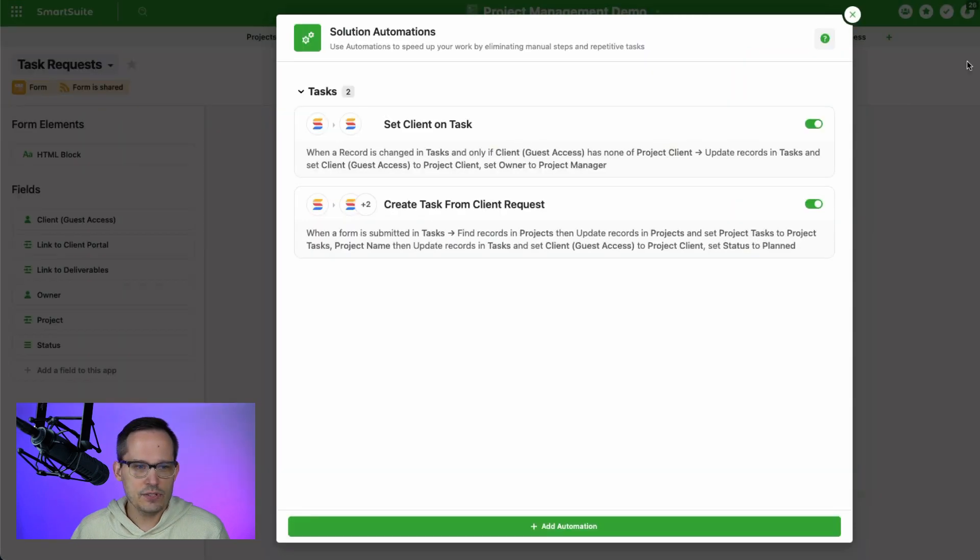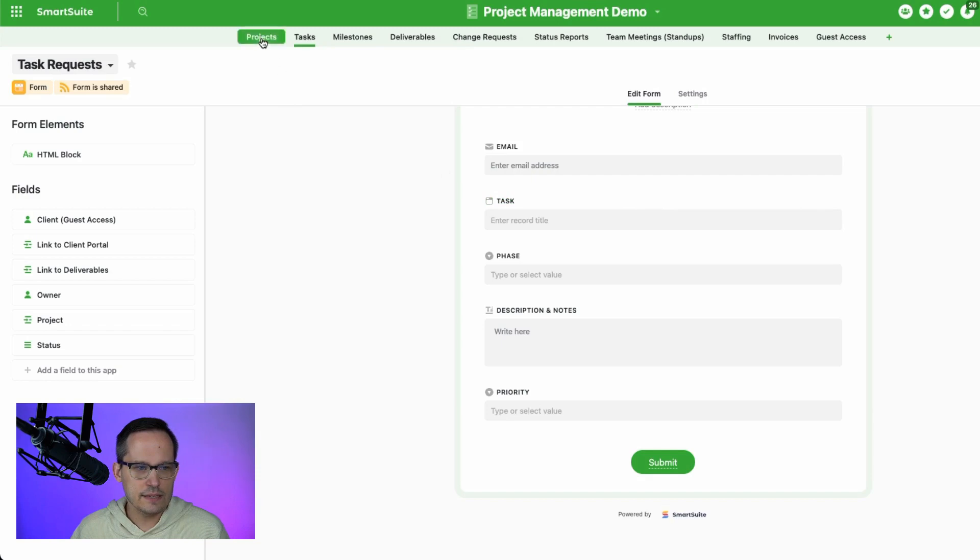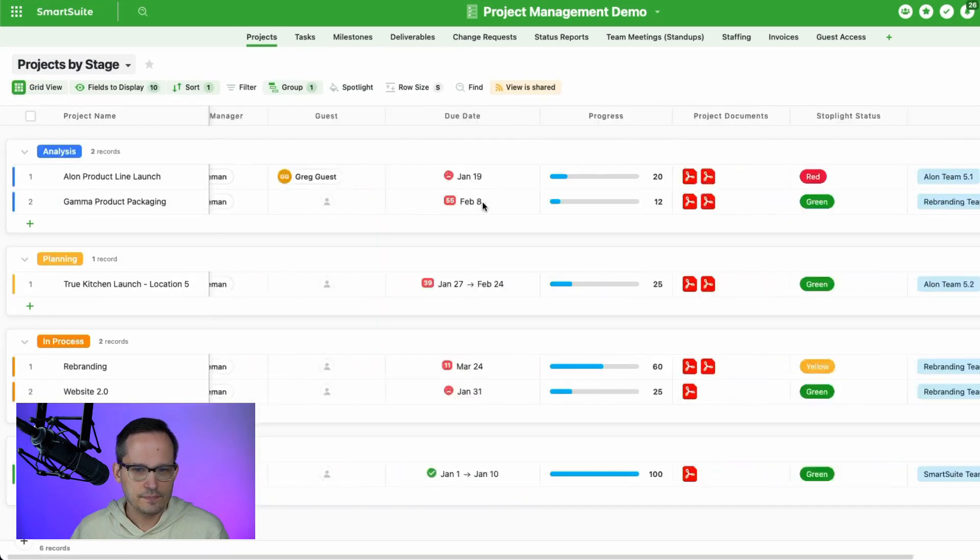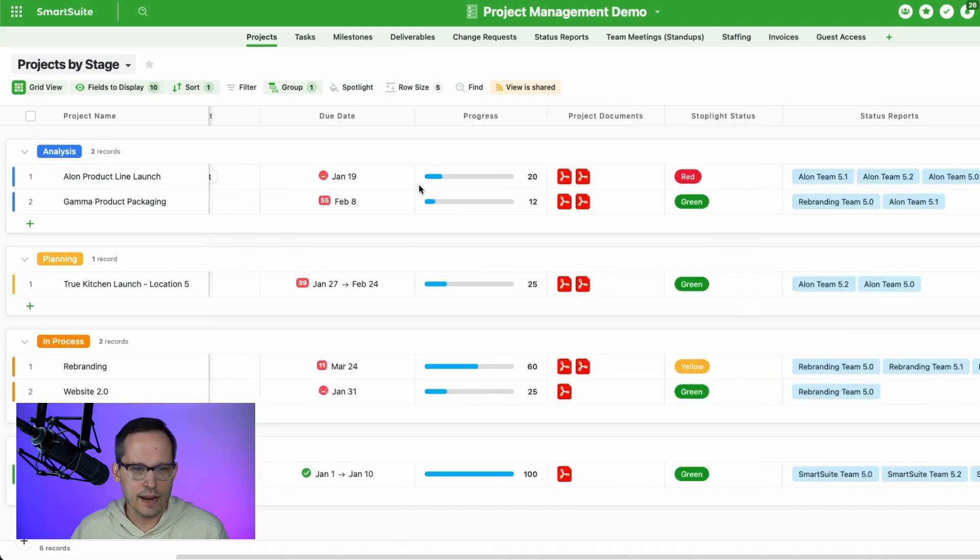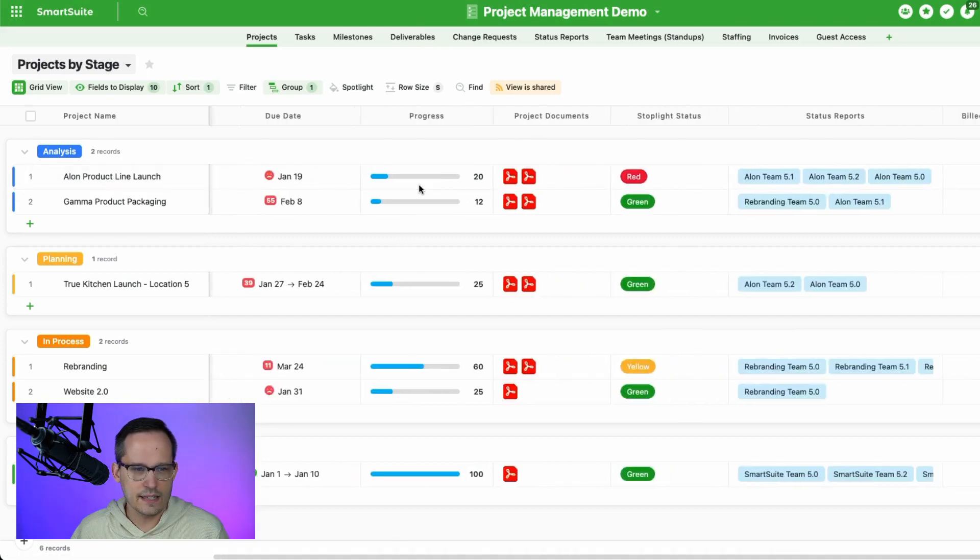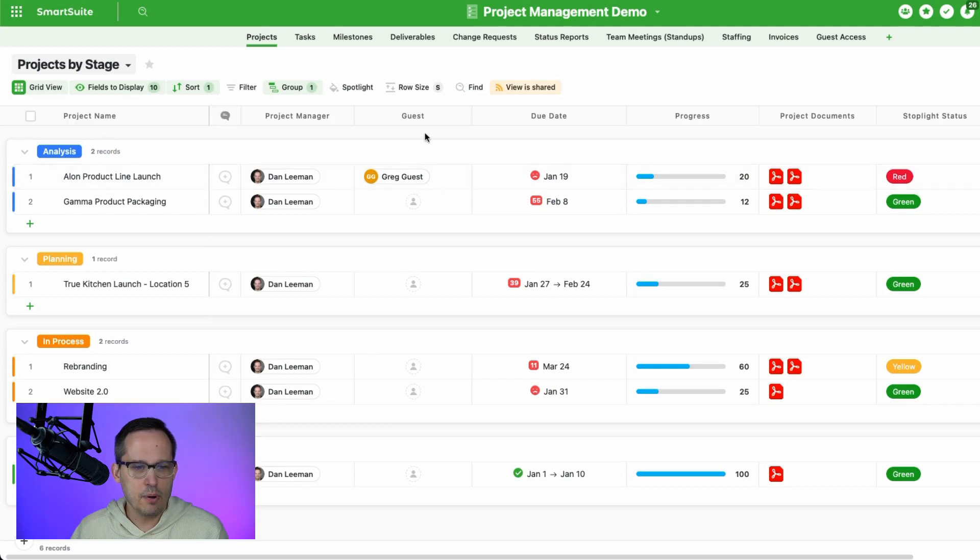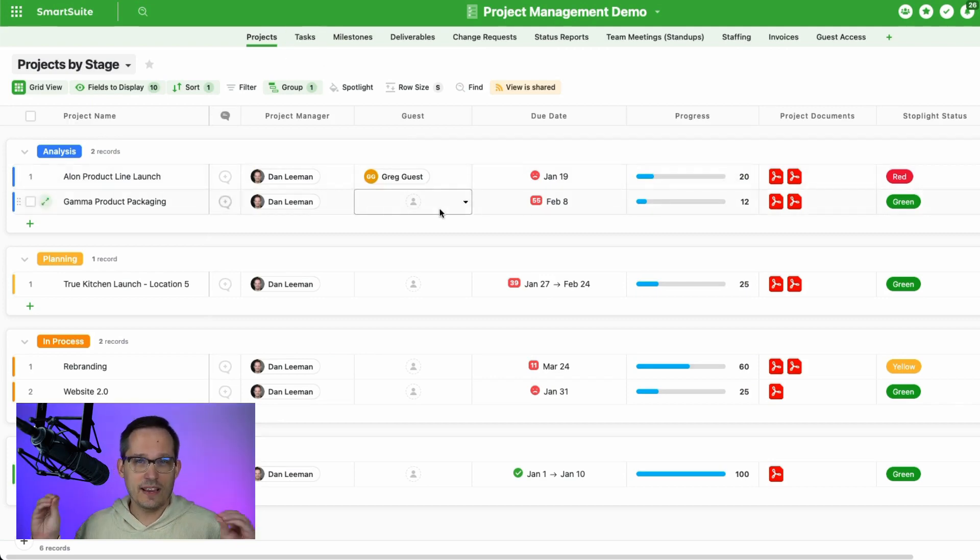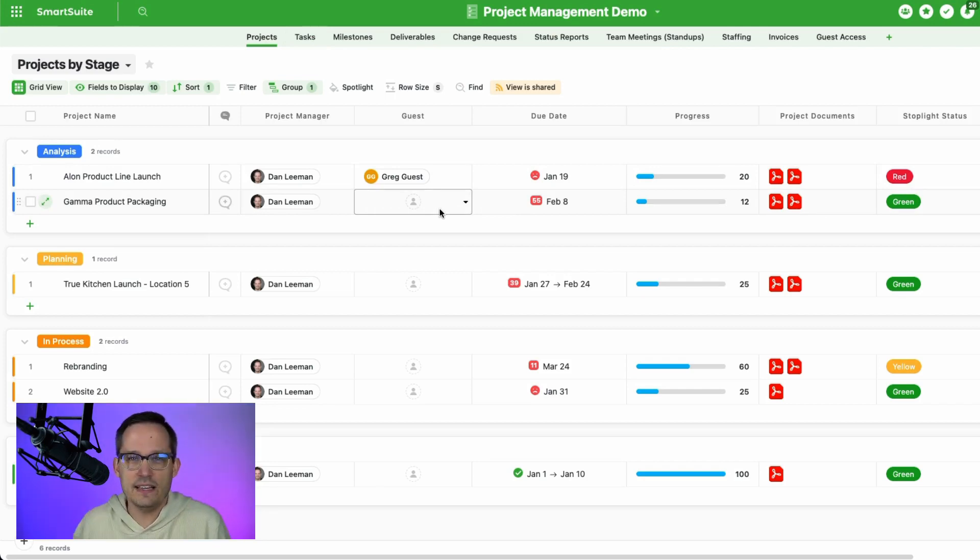So just to give you some context, what I'm doing here is on the projects, I'm assigning that project to the guest user, which is this Greg guest in this case. So I want to make sure that I have this assignment done both at the project level and as well at the task level, so that we can use that email address to then associate the two together. We have to have some kind of unique identifier.